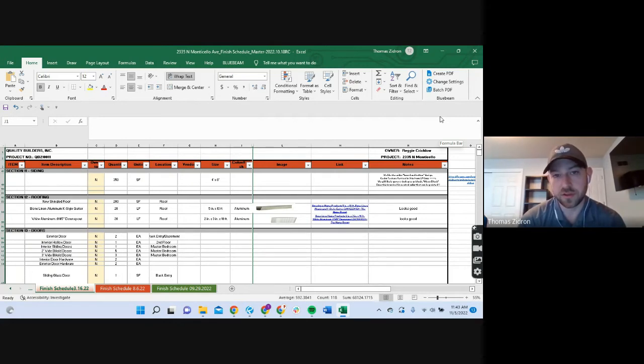One thing that we tell our clients is we do our best to be ready to go as soon as the project's approved. But people have to realize our subs have other jobs too. Just because we as the GC are ready to start, we've got to get our subs in line. So we usually tell people there's probably a couple week buffer as we get everyone scheduled, especially for the early stage subs like framing and concrete. Once they get started, we're full bore, ready to go.